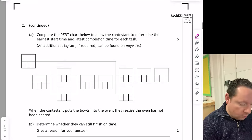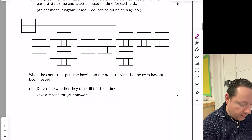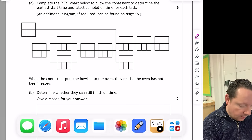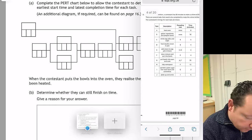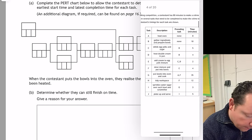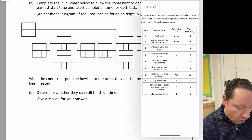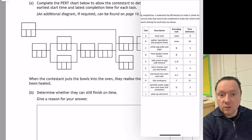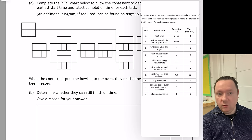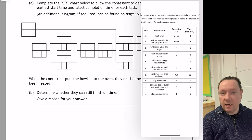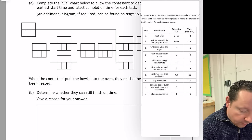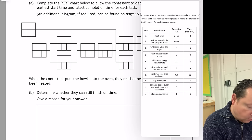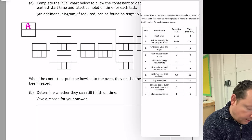Let's go to the precedence chart and open up all the tasks at the side so we can see exactly what's happening. There are all the tasks. We need to do our standard scan, then a forward and backward scan. Let's start with the middle boxes. The first thing we need to do is heat the oven — that's A — and that takes eight minutes.